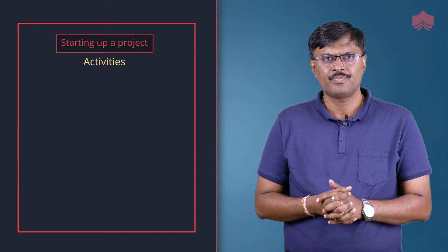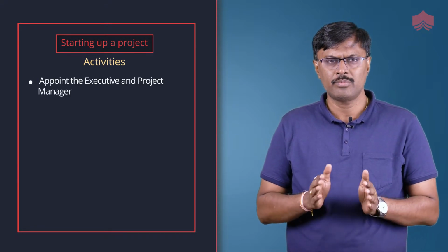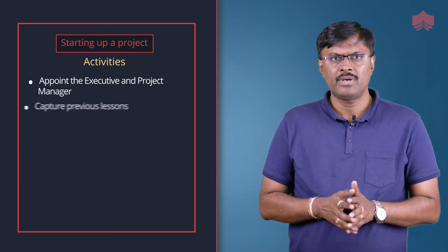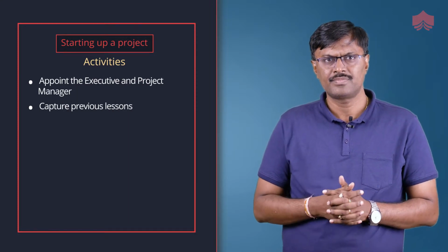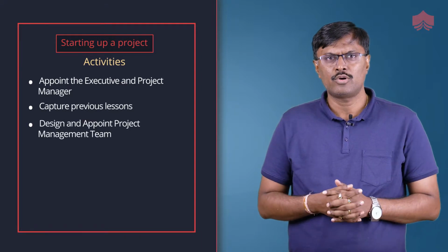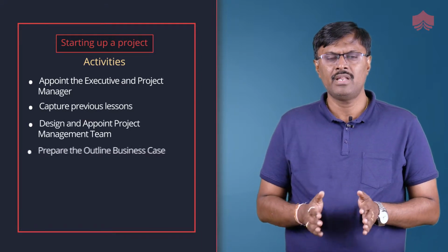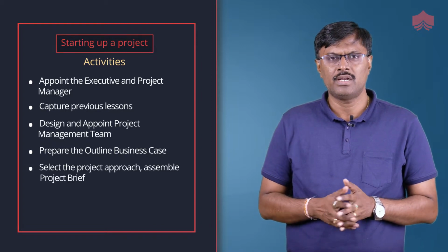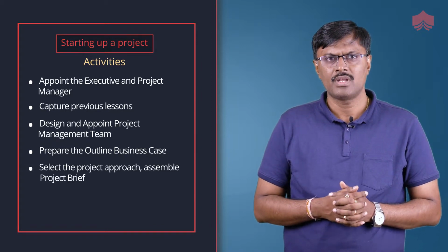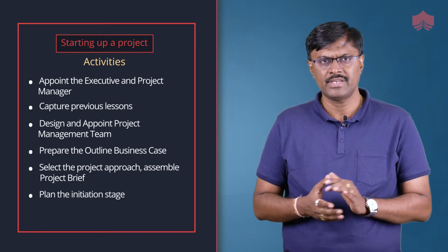During this process, appointment of an executive and project manager will be done. Lessons learned from previous projects are captured. Then comes designing and appointing the project management team, preparing an outline business case, selecting a project approach and assembling the project brief, and planning for the initiation stage.